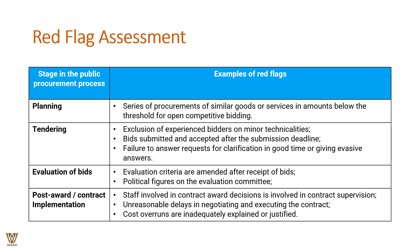At the post-award or contract implementation stage, red flags include staff involved in contract award decisions also being involved in contract supervision, and unreasonable delays in negotiation or execution. Cost overruns must be adequately explained and justified.